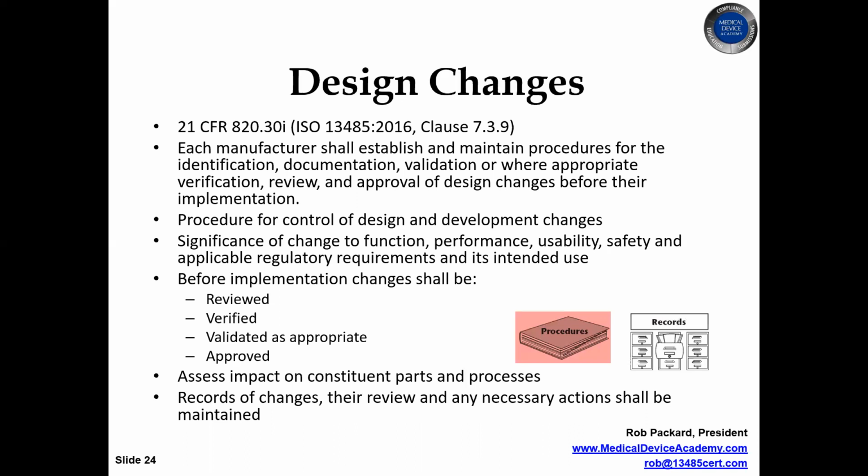But there are other changes that would. So if you removed a contraindication, that would definitely require a new submission to the FDA. So if you have any questions about what should be a design change and what needs a new submission, we can help you with that. But you should really have a procedure for that that walks you through significant changes. And they have not only the 2 FDA guidance documents, but they have a Canadian guidance document and a European guidance document about significant changes that should be considered in your design change procedure.